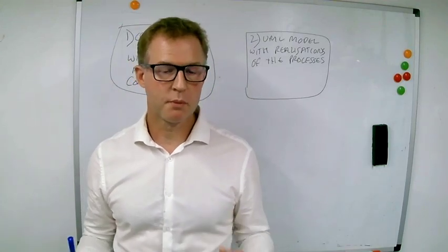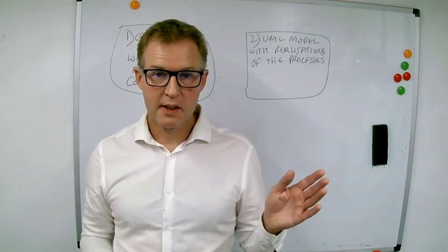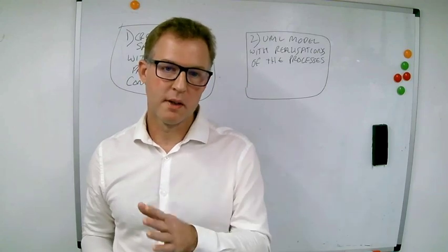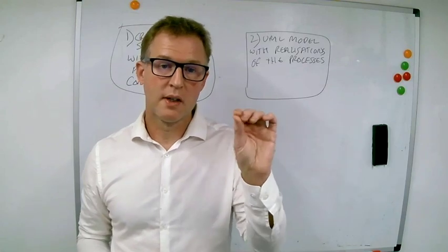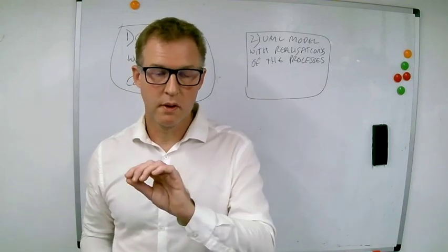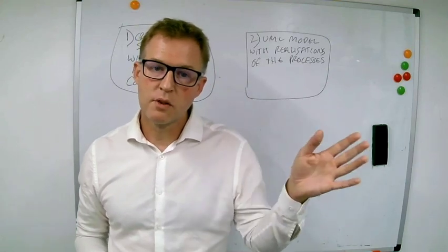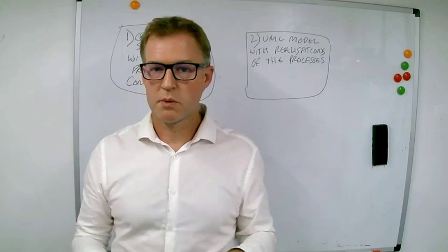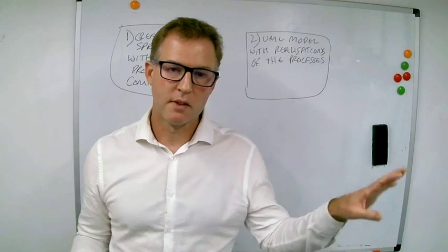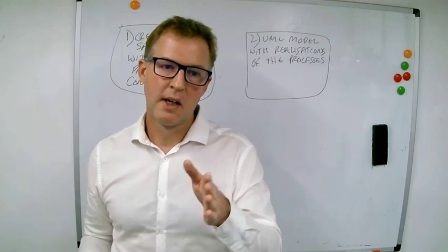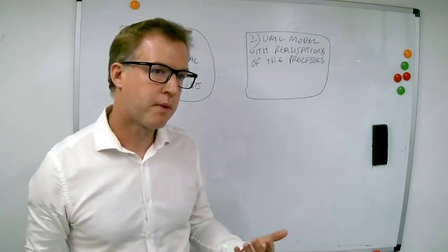Get on a call with everyone, and we used, I think it was WebEx, with the modeling tool open, and we said, okay, what are all the different steps within this process across all the different components? And we basically drew out a sequence diagram for each of the different calls, including things like authentication, including any of those individual steps, because the whole idea with this is you don't want to leave something out just because, hey, everyone knows that. You need to make sure that every single component, every single step in the journey is resilient. So we do that, we go through the process.